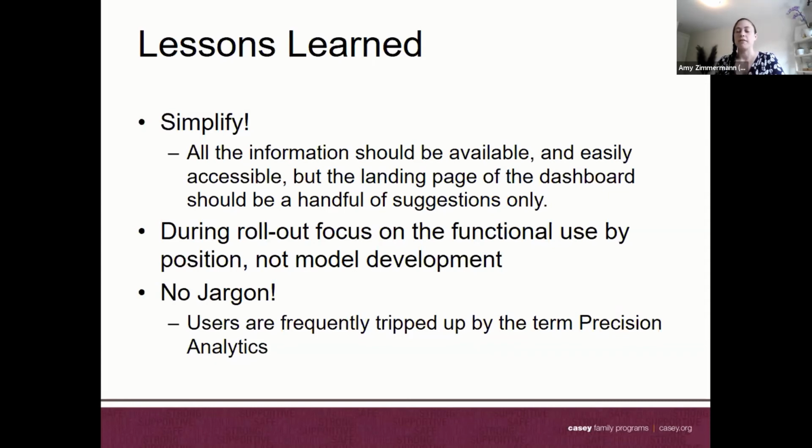And so if I could do it over again, I think a better way to go about it would be to start with bringing the social workers together first and saying, this is how you can use the dashboard to answer the questions you have. Bringing the supervisors together: this is how you can use the dashboard to answer the questions that you have in your role. And then having an additional presentation for the detailed information for those that really like to nerd out in data, but to not overwhelm folks who just aren't interested at that level.